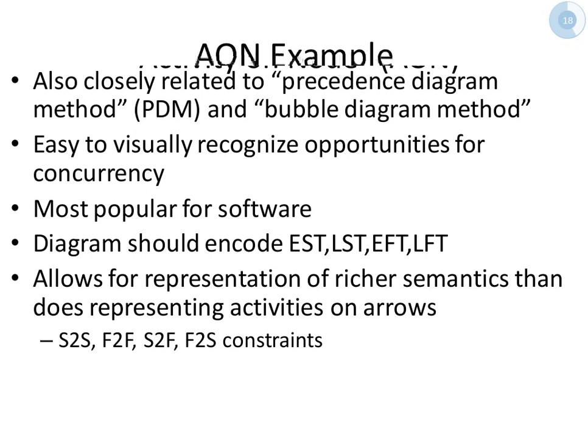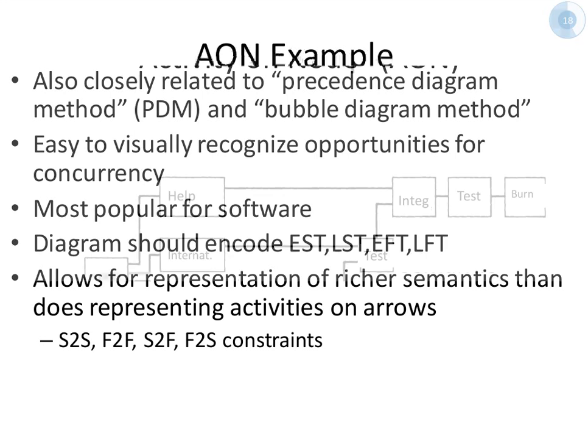Okay, so all we do for our case is add the duration of the activity. So it's particularly trivial. This is not in general true, particularly where you have different start to finish, finish to finish, start to finish types of dependencies. So in general, we're going to have this very simplifying case.